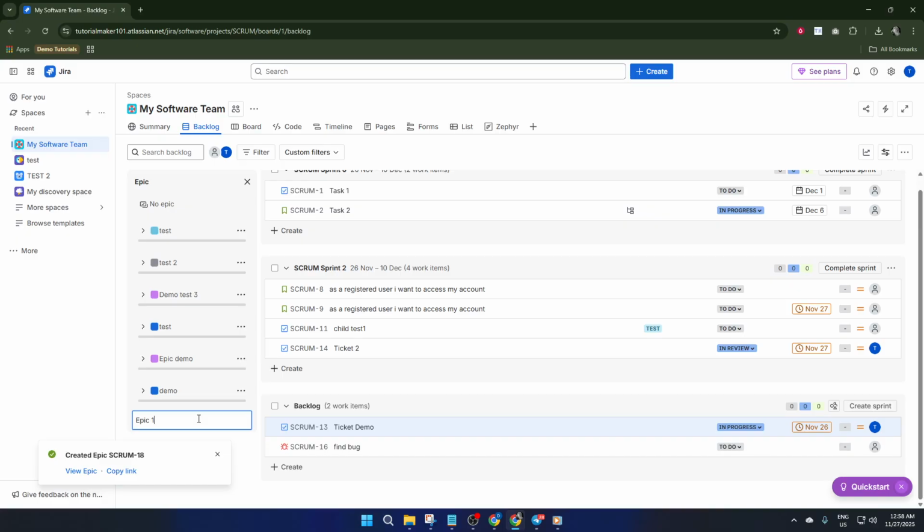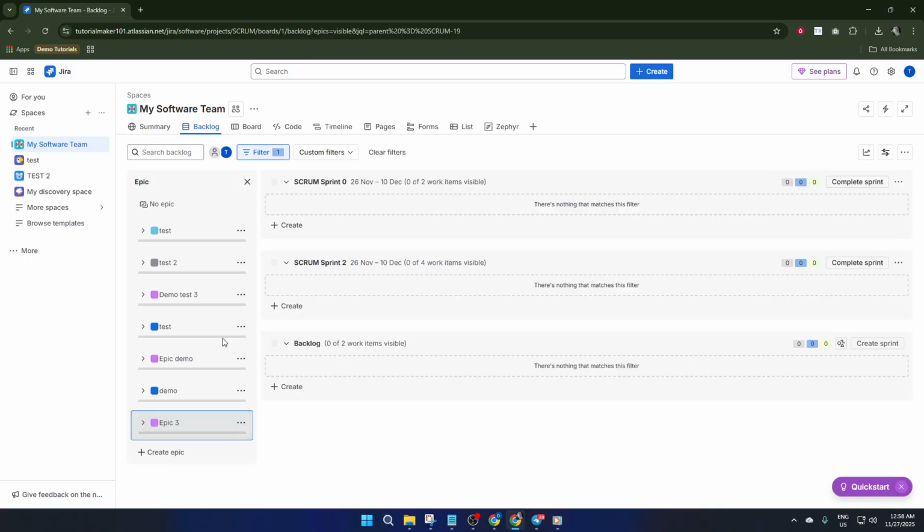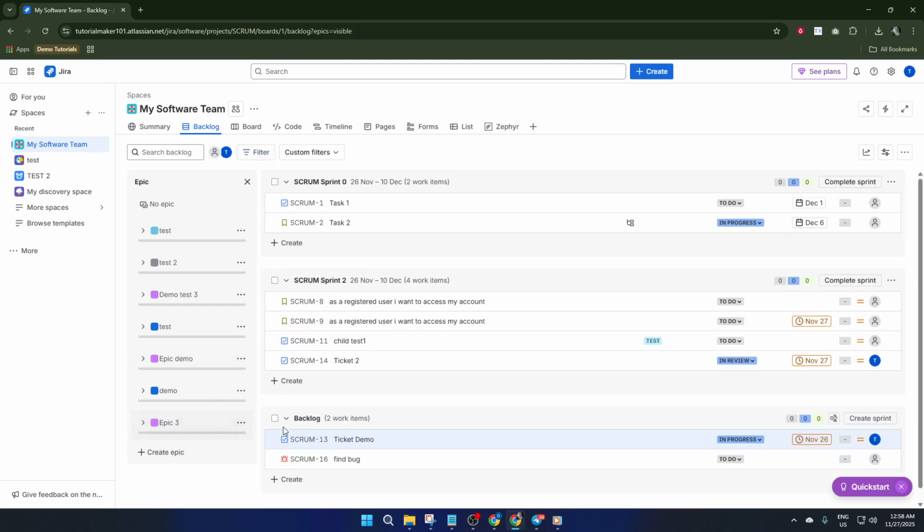And don't forget the subtasks. It's helpful to make stories even more actionable by breaking them into subtasks someone could realistically finish in a day or two. For example, if one story is add user authentication, your subtasks might be design login form and implement backend validation. This way, everything stays bite-sized and trackable, making it less overwhelming and easier to distribute work among your team.